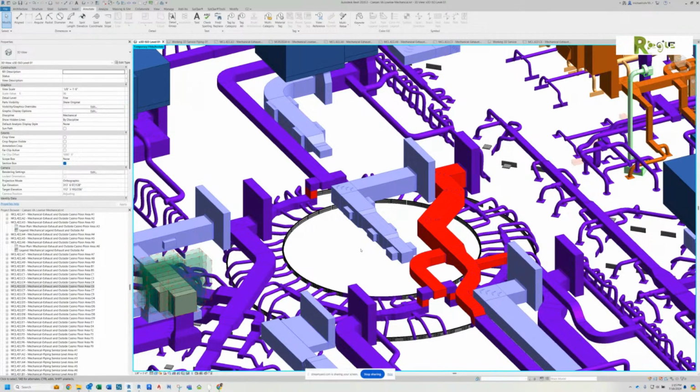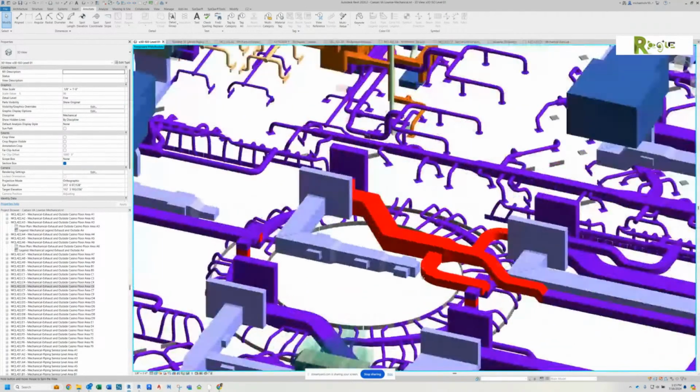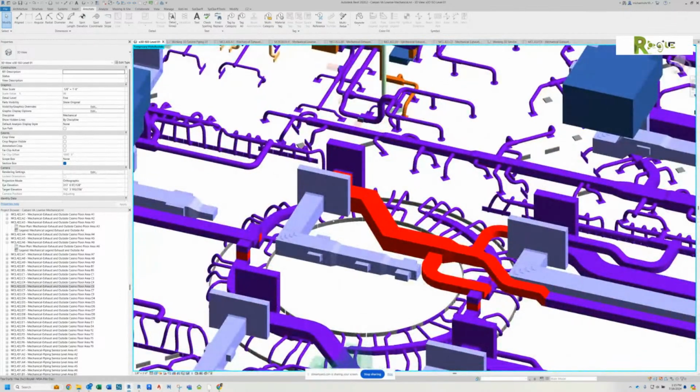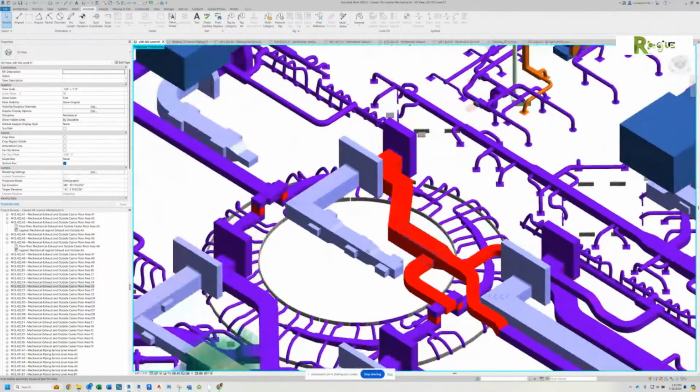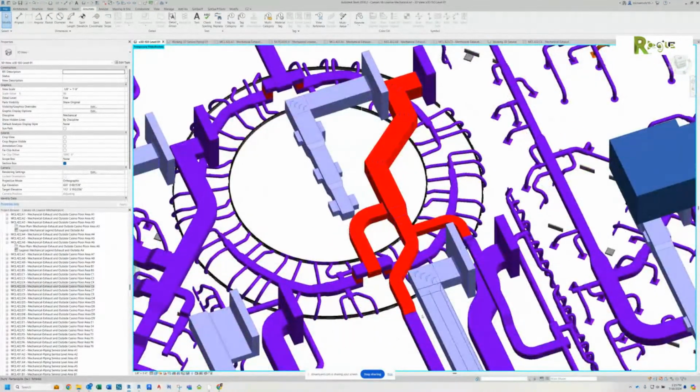So everything that hooks to that red's going to have to, if the whole bulkhead's going up, then all that gets raised, correct? No, only the stuff that's over the bulkhead right here that's going to be raised up right here. So this back here, this right here, this is attached to it. So just that stuff right there. Because it's dipping up here and dipping down right there, and then here it's not an issue. So it should just be this ductwork right here.